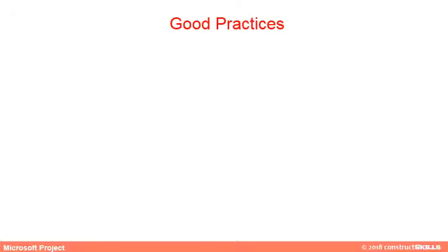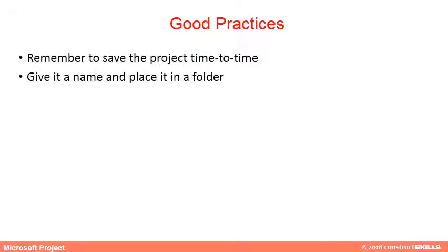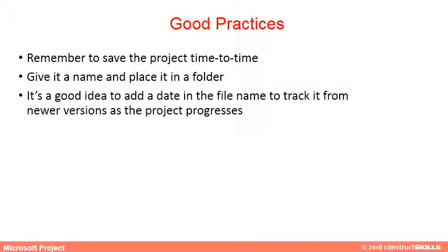It is a good practice to save the file from time to time. It's a good idea to add a date in the file name to track it from newer versions as the project progresses. Each project update should be a new file.